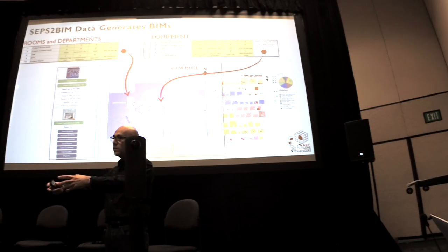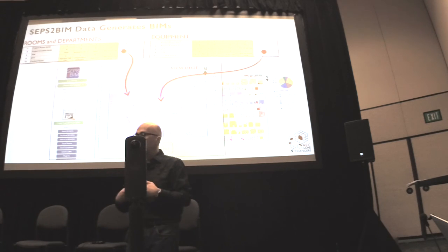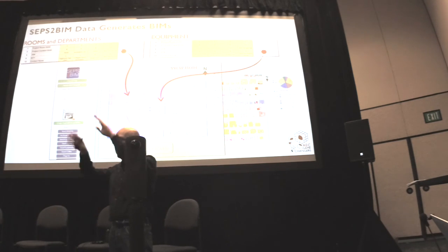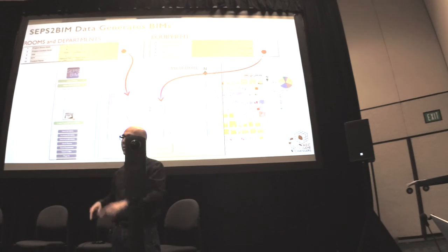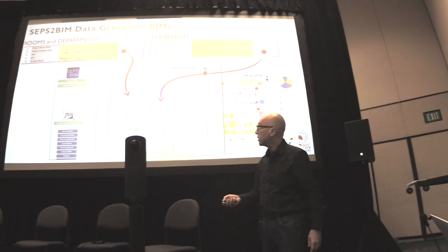They're saying these are our requirements, so when we give data back in that exchange, we can do a delta check with tools like what Jonathan showed, or even with an Excel file. So list the 2,000 pieces of equipment and show me where the deltas are in Excel, because Excel does that as well. Or if you want to see the clash detection and everything, you have that as well.